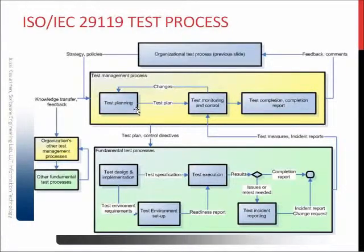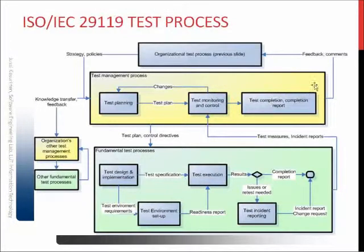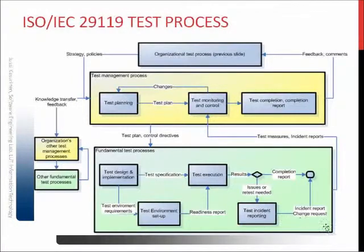The yellow box represents the test management in one project, meaning it includes test plan creation, planning testing, doing monitoring and control, and test completion on the finished project — this is the project manager level of administrative work. The project manager is required to apply the strategy and policies in their own test plan, which is then realized by the fundamental test process, which includes test environment setup, test execution, and test design and implementation.